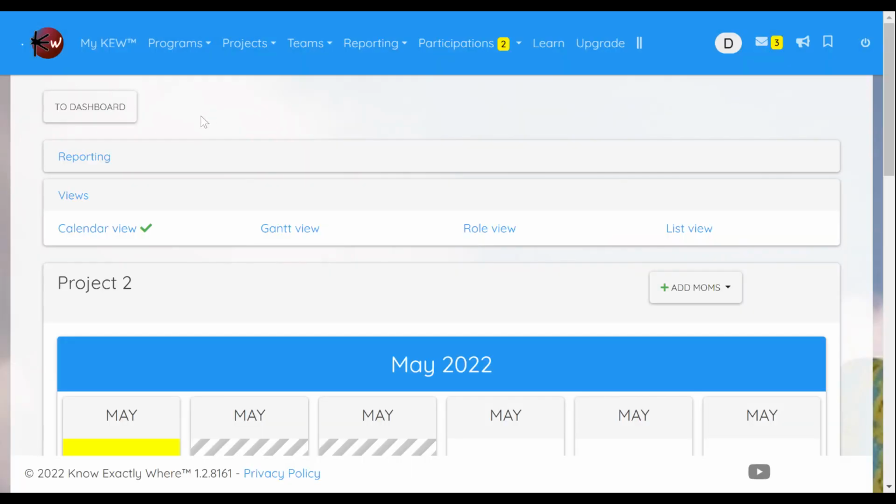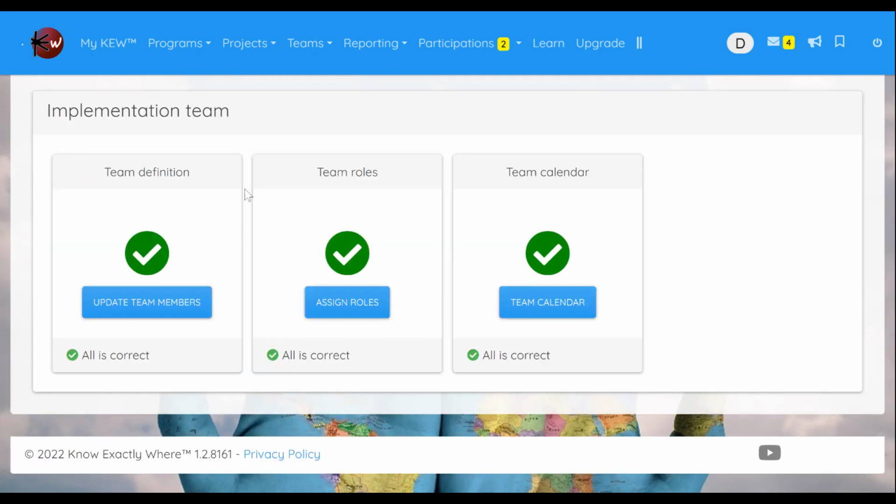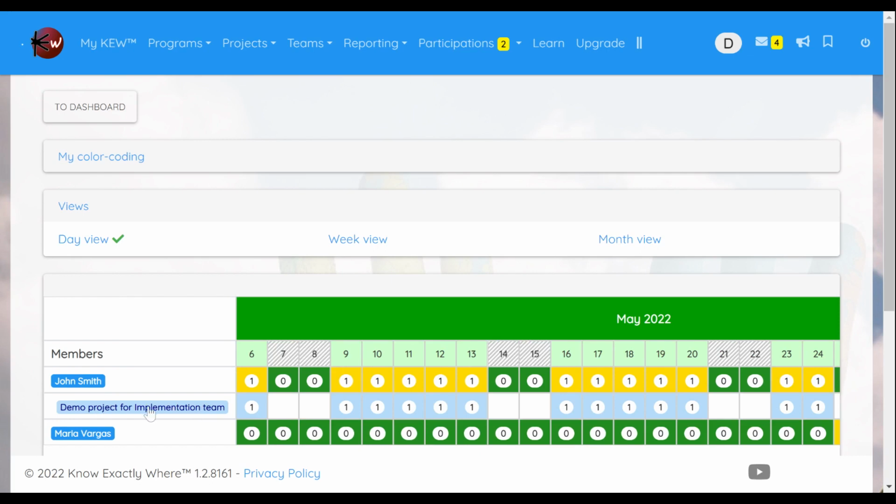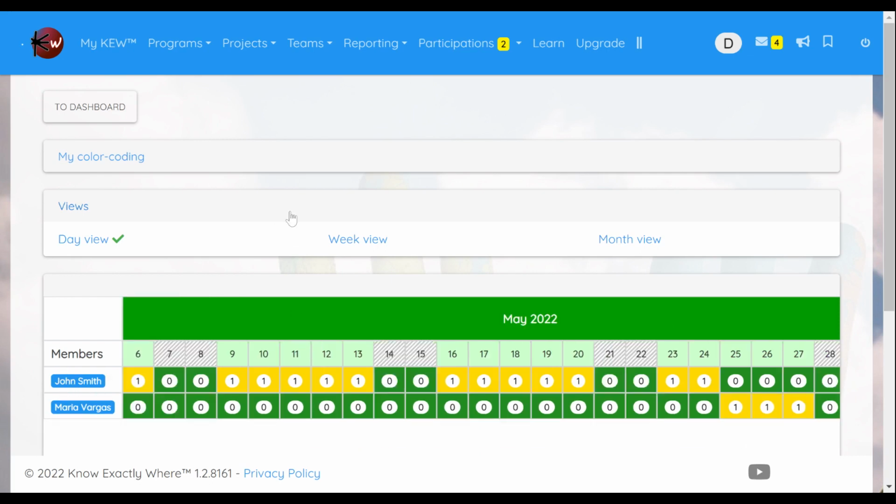So we just wanted to see that those two projects are now counted. So if I go back to the team and I see the team calendar, this new project I created is not going to show. And I wanted to first show you this. You still see all ones and you don't see any twos anymore. So if I again drill down, there's only one project here. And the reason is that the project has not been shared. So the project manager, in this case myself, this same user, hasn't shared that project. And that's a purposeful action that needs to happen.